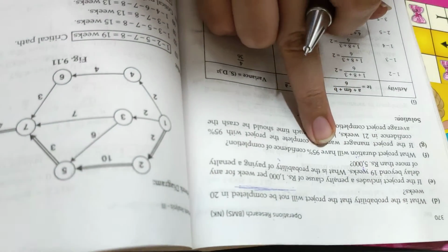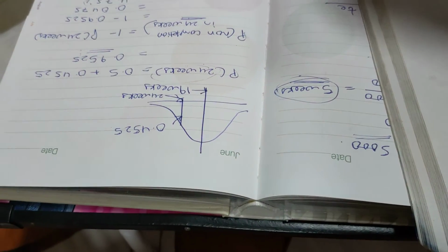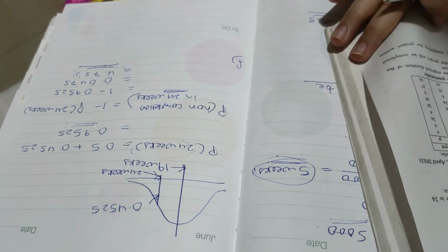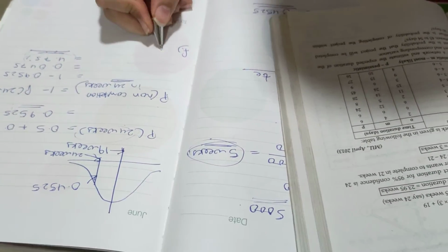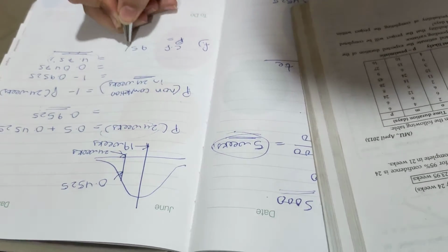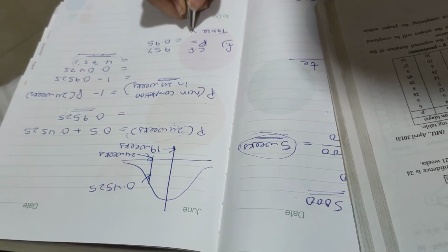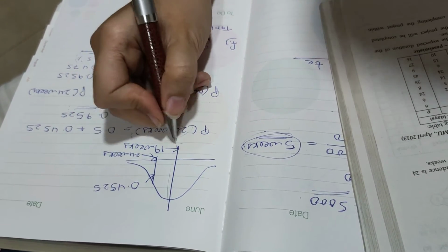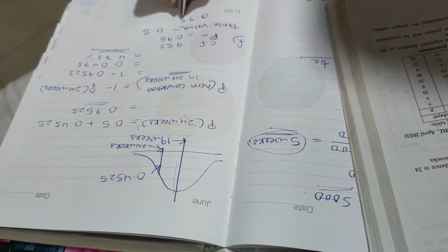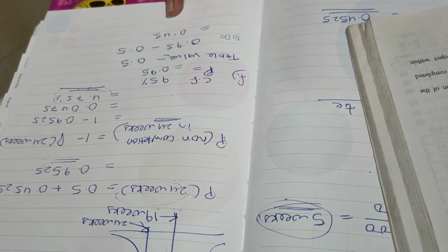What project duration will have 95% confidence of completion? मेरे प्रोजेक्ट को कितना टाइम लगेगा 95% काम खत्म करने में? This is the reverse sum what we have done, right? See how this will be. Probability of confidence level is 95%, which is 0.95, right? So table value we will calculate as, at center I already know it is 0.5, right? So what we will do, 0.95 minus 0.5, that is 0.45. Now I will find this value in the table.